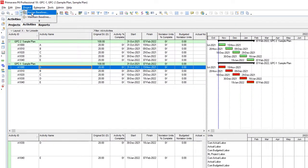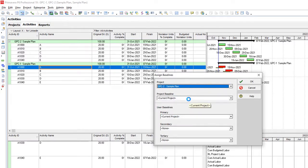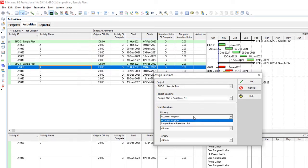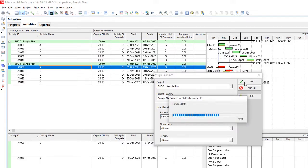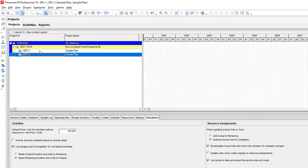If I go to Assign Baseline and select the second project which was already imported, this project does not have any baseline assigned. But if I open this list box, I have the Sample Plan baseline available to assign. So this project has the same baseline as the original project. By using XML format for export, you can export your project including its baseline. But if you don't want to export using XML format, what is the solution?